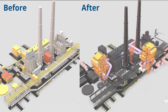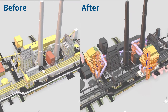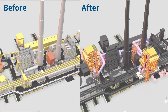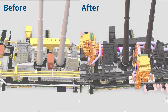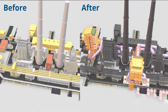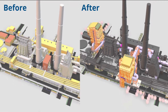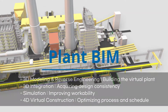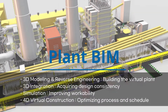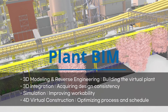Because the space between the existing plant and new SCR was too narrow, and the vertical structure was the main configuration of the facility, there were so many risks of accidents, constraints of logistics, and using the equipment. That's the reason why we applied plant BIM technology to complete the project within a given time, by removing delay factors in advance.